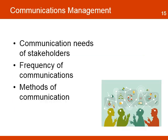The communication plan is another important plan in the project. Each stakeholder has a different need for information from the project, and the communication plan helps organize these needs, including the format and the frequency of information each stakeholder wants to receive. For example, the donor has a requirement to receive project reports on a quarterly basis. The plan will capture this requirement to ensure the project team delivers the report on time.